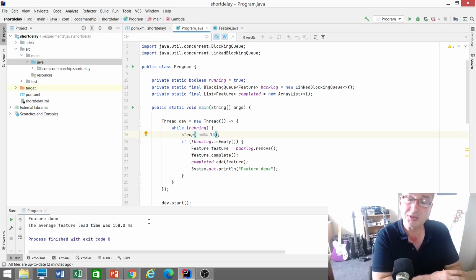And you will see this effect everywhere. And you can probably measure it in your own organization. If you're collecting information, say if you use Jira, God help you, about cycle times, how long, for example, features take from when they're picked up by the developers to when they're in production, and overall cycle times, those long lead times, you can maybe build your own little graphs if you've got enough of a product portfolio to work from. And also see what happens if you plot those lead times against your build and test cycles, because build and test is the innermost loop. That tends to be the thing that makes development cycles slower.